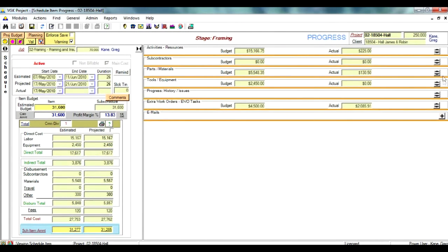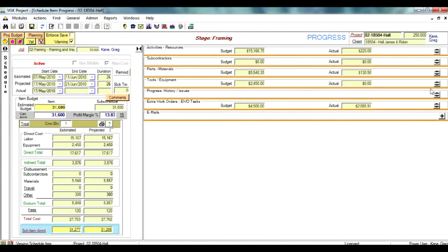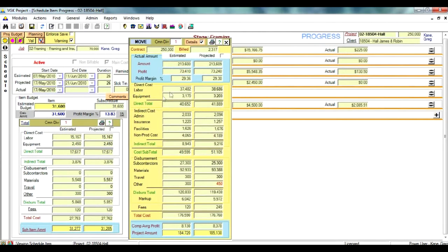Each component defines scope of work, man-hours, quantities, durations, etc. Using VGK advanced calculations, work scope is automatically translated into monetary values and produces an amount for each task. The calculated amount gives managers solid ground to set a comprehensive budget for each task. Task budgets are automatically propagated through the schedule to produce the project or job budget.